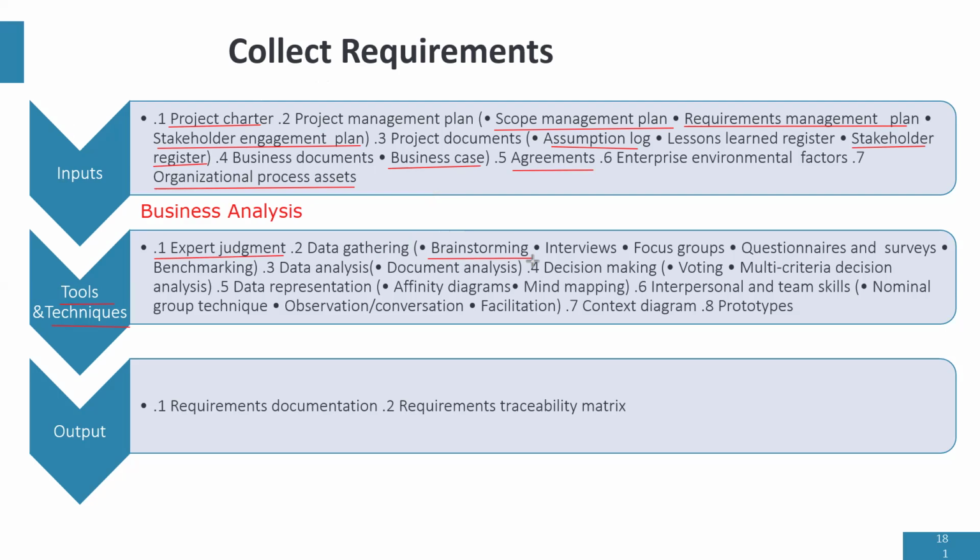So you are working on a new project and you're there with your team. The client is requesting a particular solution. Your team can brainstorm. Oh, you're going to need this for this project. Oh, this is going to be needed. So they're generating ideas about requirements. We can interview subject matter experts and project participants to obtain requirements. We can have a focus group discussion, right? A focus group can include pre-qualified stakeholders, subject matter experts, and project participants, and you're discussing, and from that discussion, you're getting requirements.